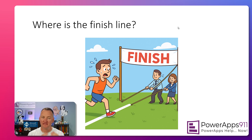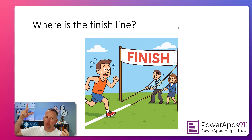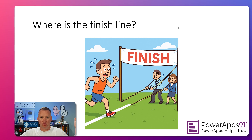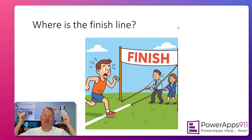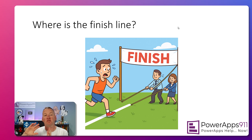Where is the finish line? This is one that my buddy Scuba always struggled with with his customers. When he would start an app, they'd say build me this, and then scope creep, scope creep, scope creep — the project would never end. He needed a finish line. What you've really got to do is define what success looks like. If he can say, when the app does these four things, we're done — then we're going to do another project, put the next six ideas in the next phase, and put another finish line there.